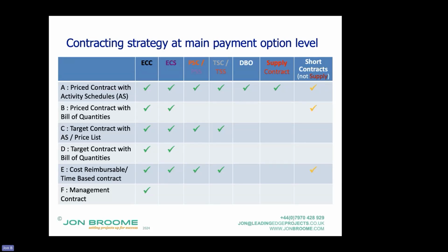There's what they pay their subcontractors in accordance with those subcontracts, so directly reimbursable, and according to a schedule of cost components for the costs which the contractor is incurring internally. Okay, and you tend to use them when the project is time dominated or quality dominated, and therefore it's subject to lots of risk which you haven't had time to nail down.